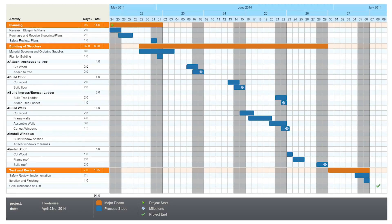In the rest of this video, we're going to be constructing a Gantt chart for building a treehouse. This is a treehouse for your younger brother and sister, and you need to have it done in six weeks for their birthday. To apply step two and select our time block, we first looked at the overall length of our project, which is six weeks. So our options for time block are one week or one day, and for this project we are going to select one day.